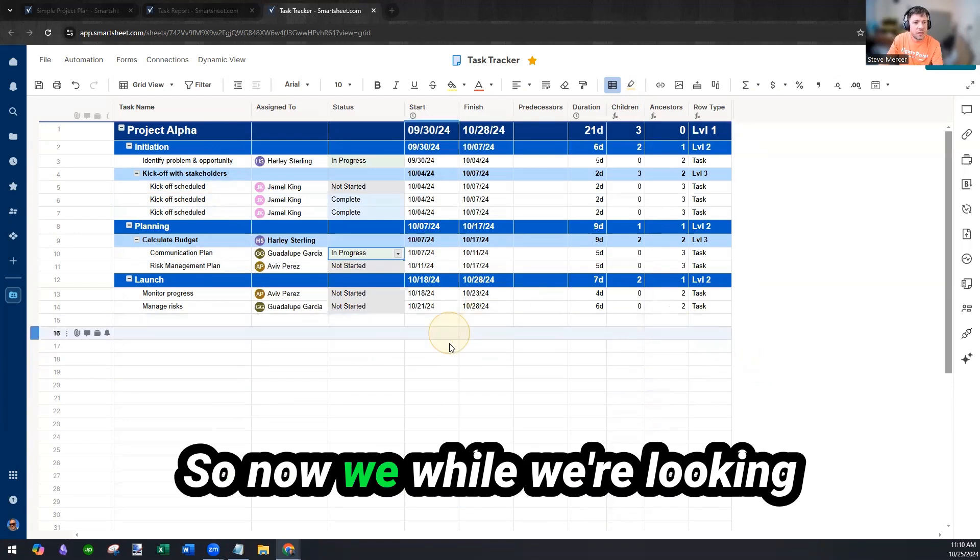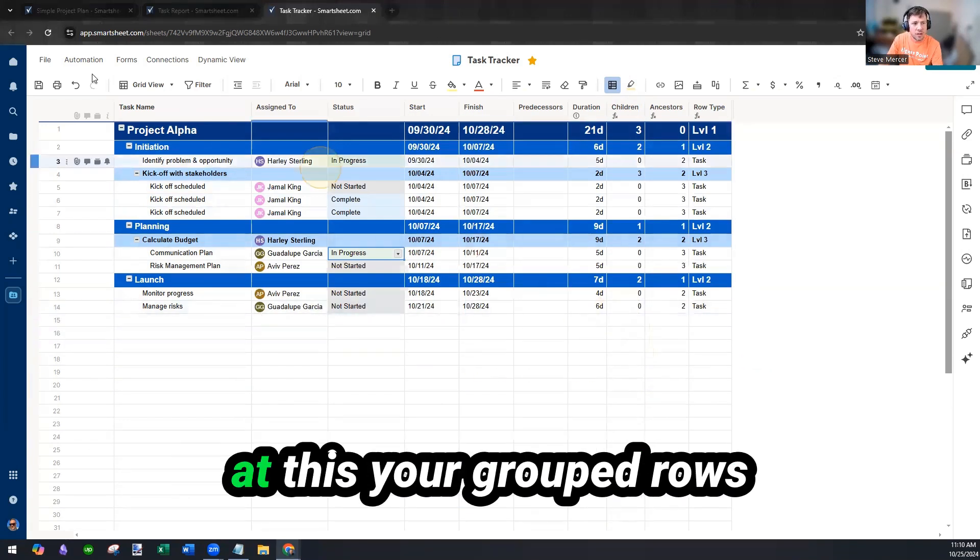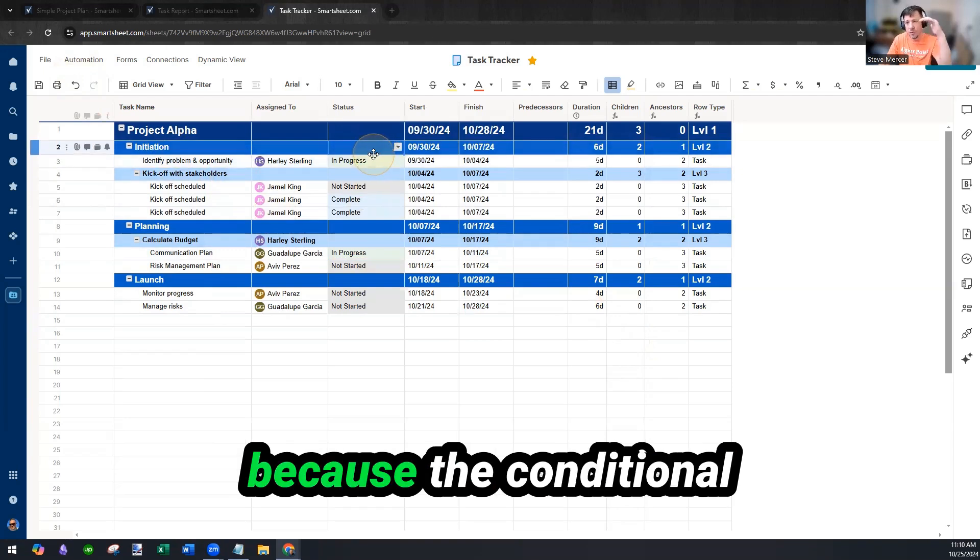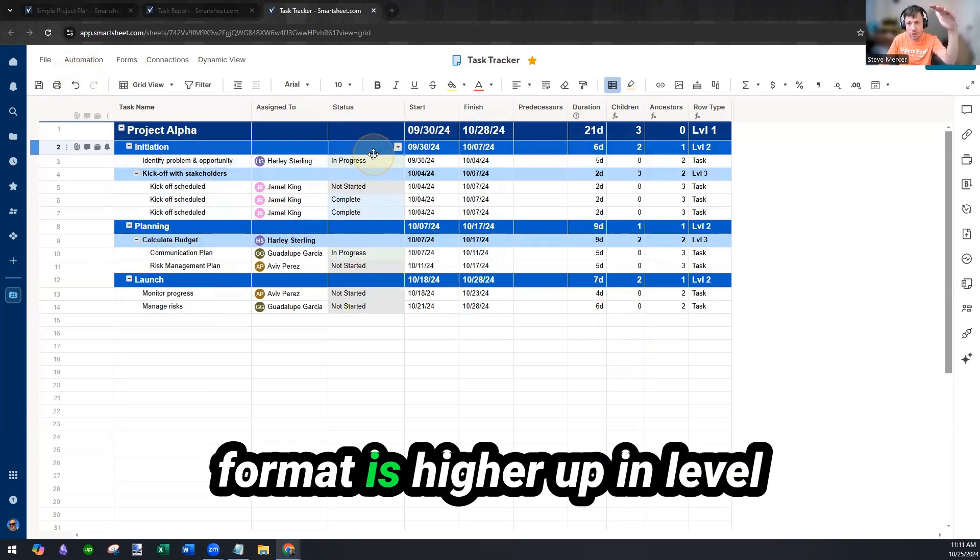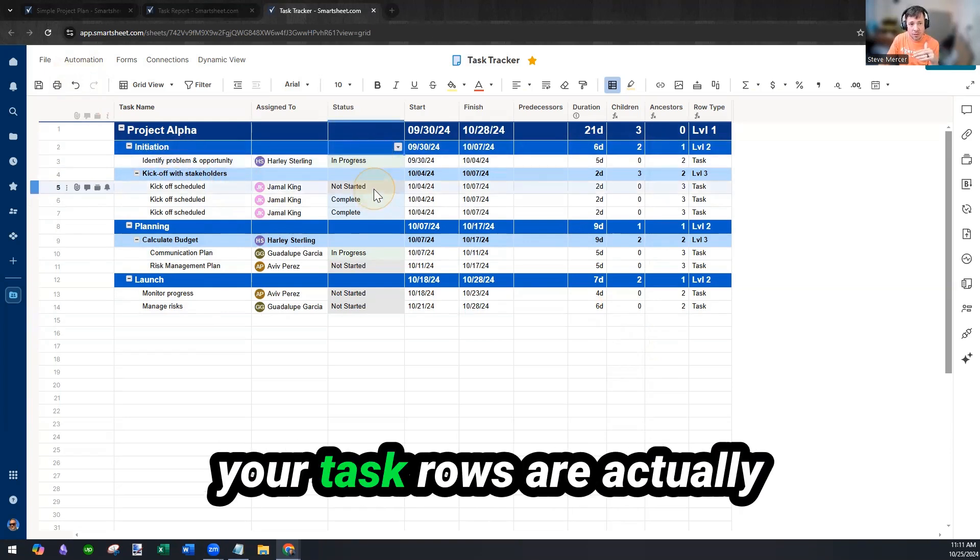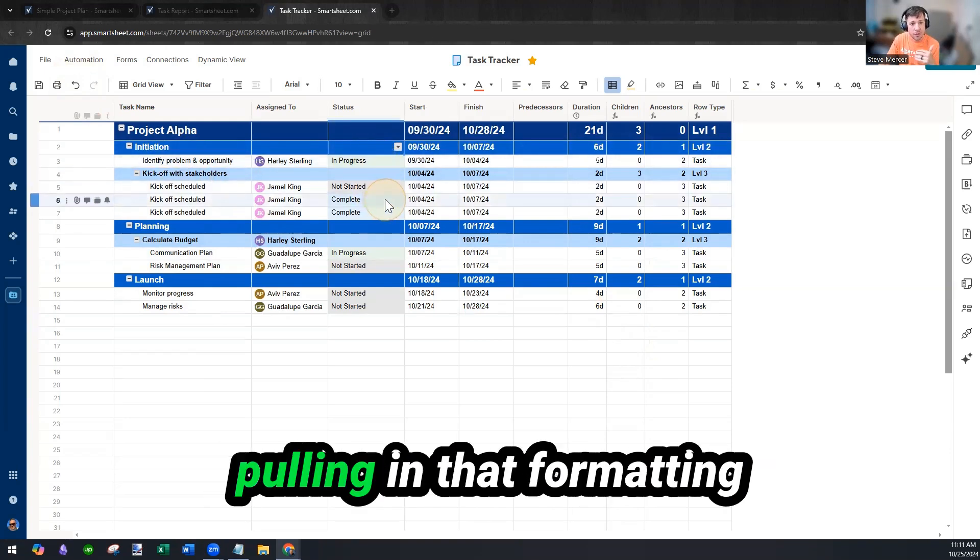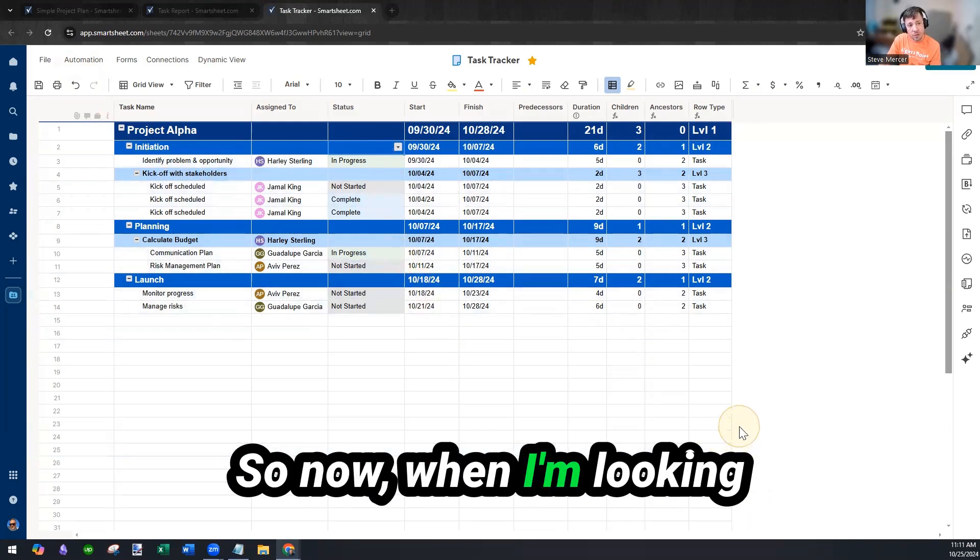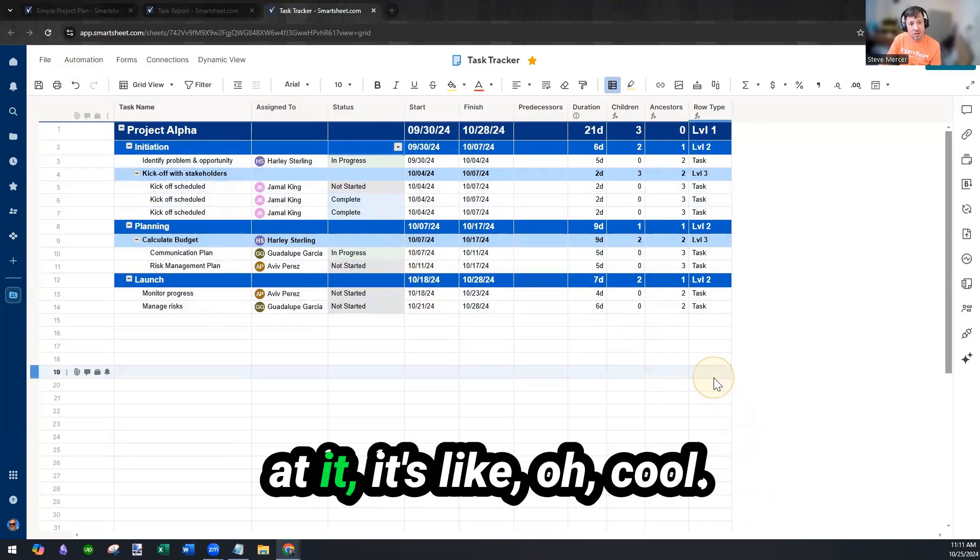So now while we're looking at this, your grouped rows don't hold the formatting because the conditional format is higher up in level and only your bottom rows, your task rows are actually pulling in that formatting for the status column.